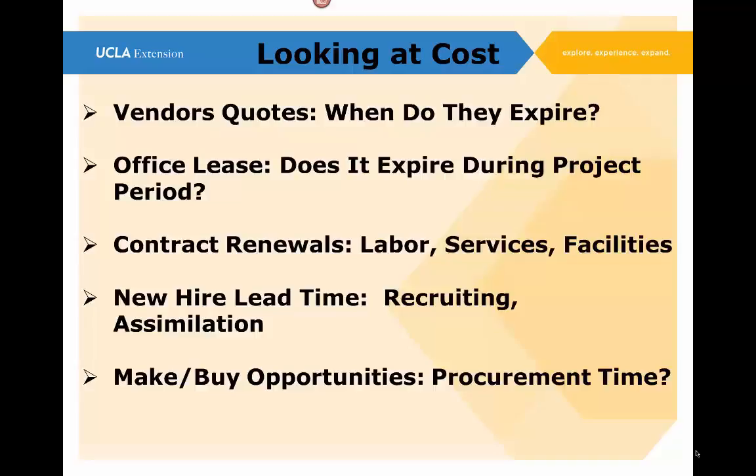But also, the rates that we may have to pay internally, including the overhead and everything else, it might be cheaper to go outside and bring in temporary software developers, which would be cheaper, but yet they'd still have the same skill level that we need. So we have to look at the make-buy opportunities. What's more cost effective for us when we're looking at cost risk?